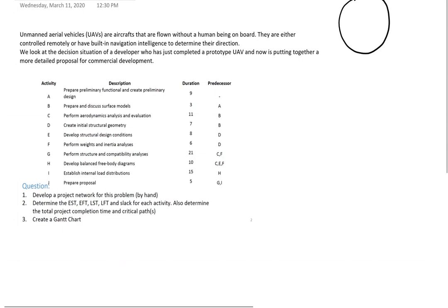In the activity node, we divide it into 6 parts, and we call each activity activity I, and each activity will have a duration and earliest start time, earliest finish time, latest start time, and latest finish time. Okay, so this is our activity node. We can draw it on the side to use as a reference, and then we can start working on the project network.